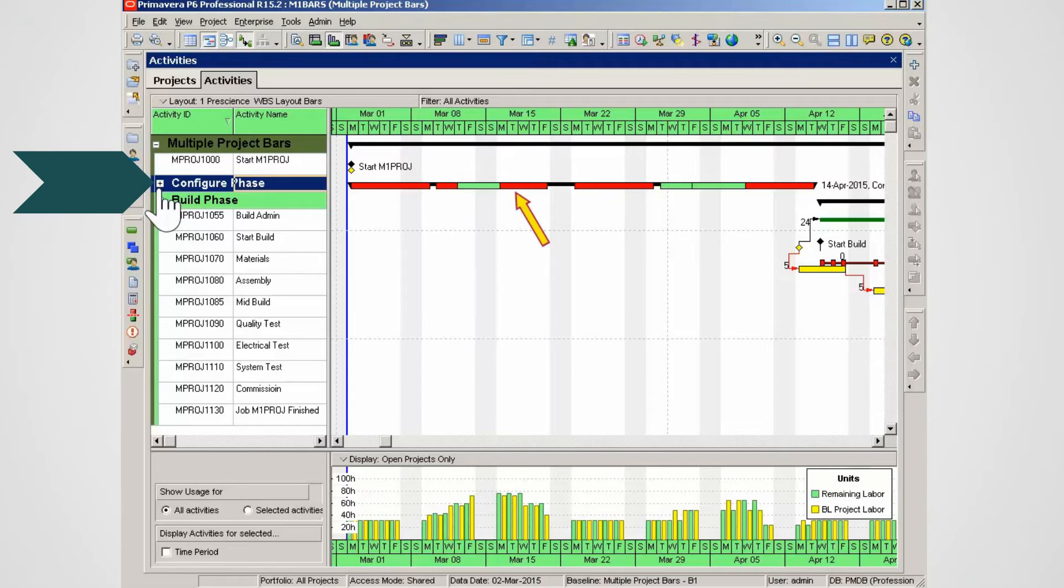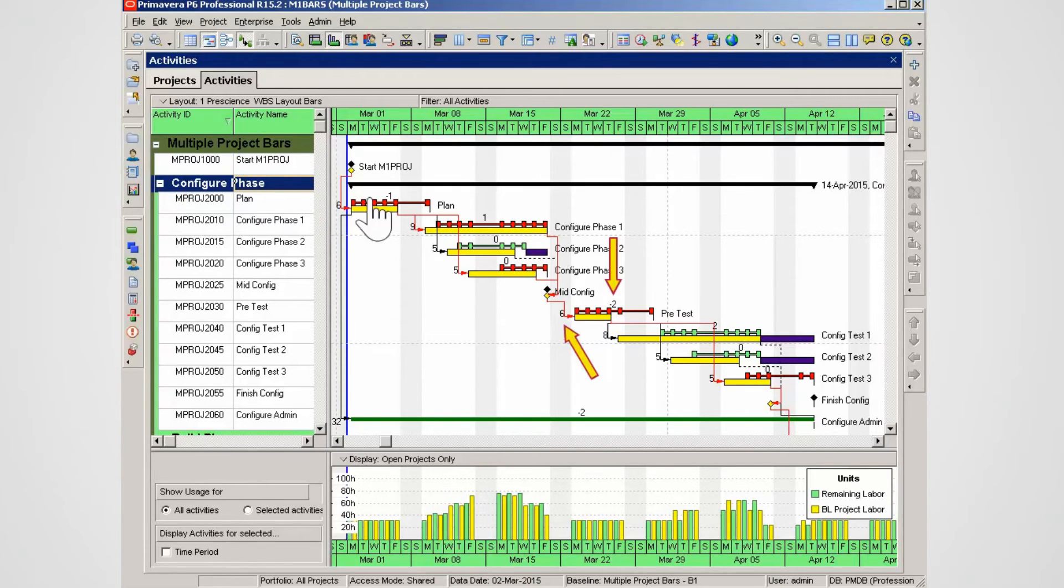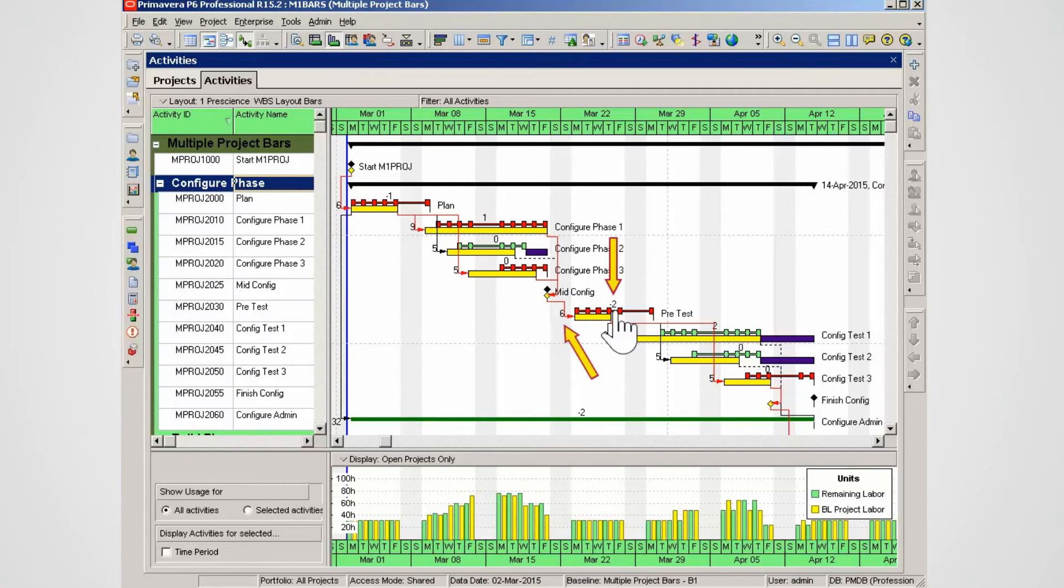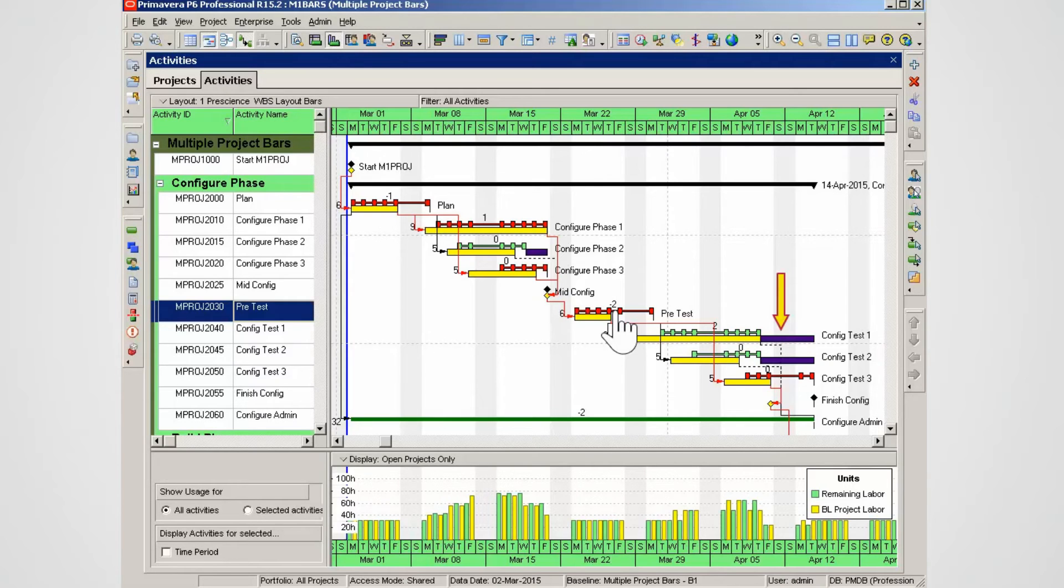Expand the WBS by clicking on the plus sign. Note top center of the activity bars display variants BL project duration. On the left the original duration is set, with activity name set to the right of the bar. In the Gantt chart the float bar displays indicating where work has been delayed which is now affecting completion deadlines.